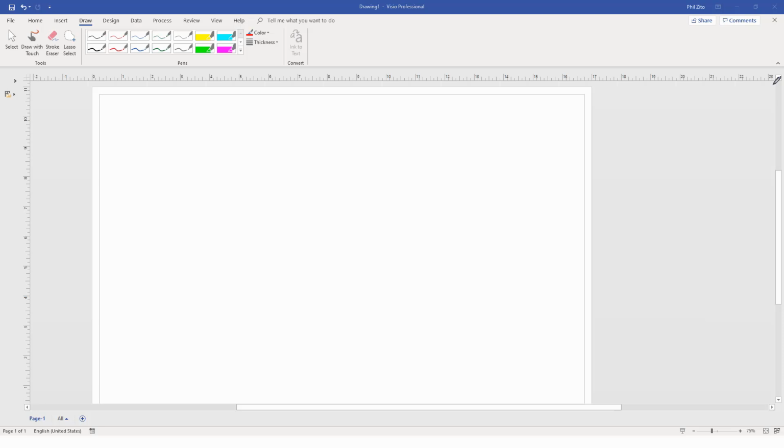So on plan and spec work, I would say it's a controls contractor. Now, if you get to integrated project design or P3 projects or design build projects where you have like a technology contractor, yeah, in that case, I could see that technology contractor overseeing network design, especially if they are the ones sourcing the switching providers. So, like all answers, there's no end all be all.